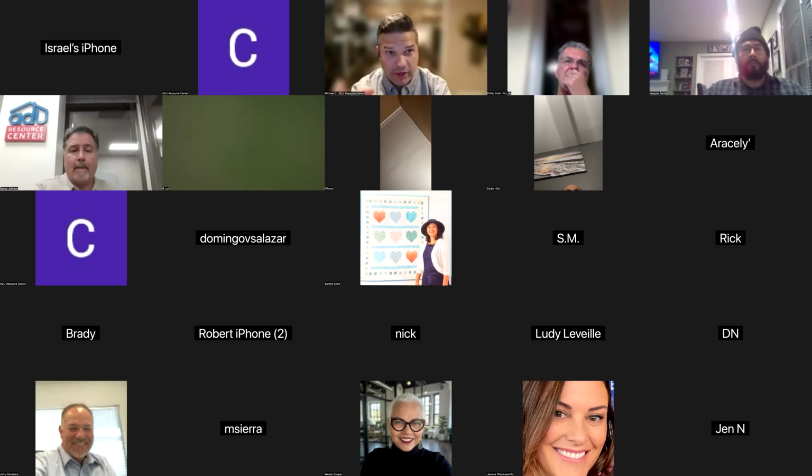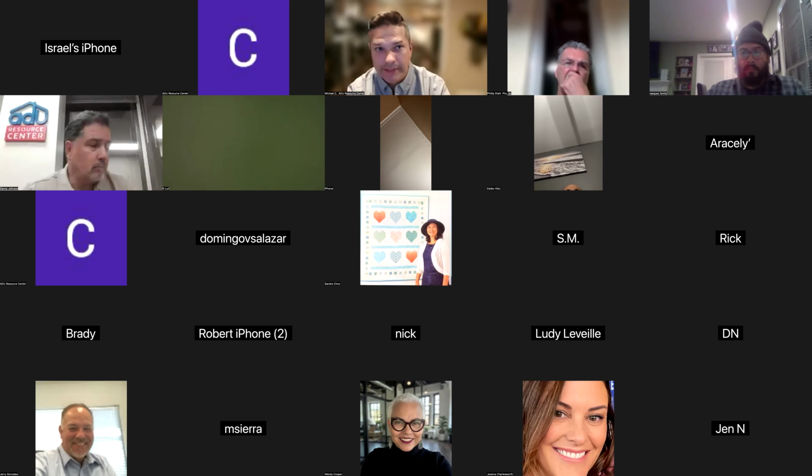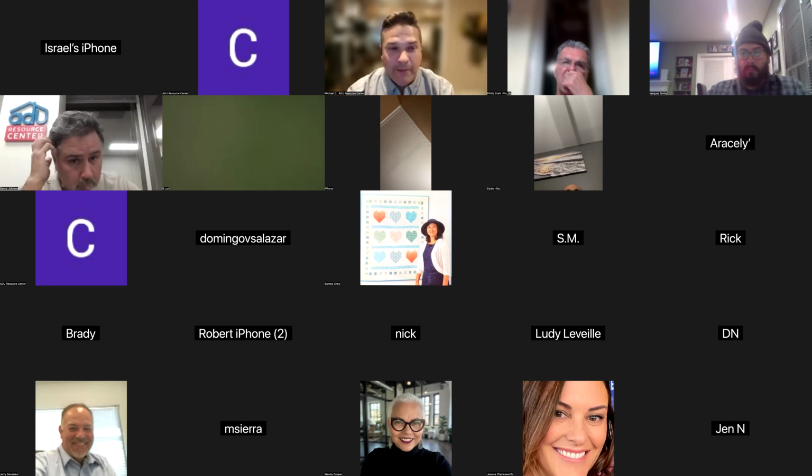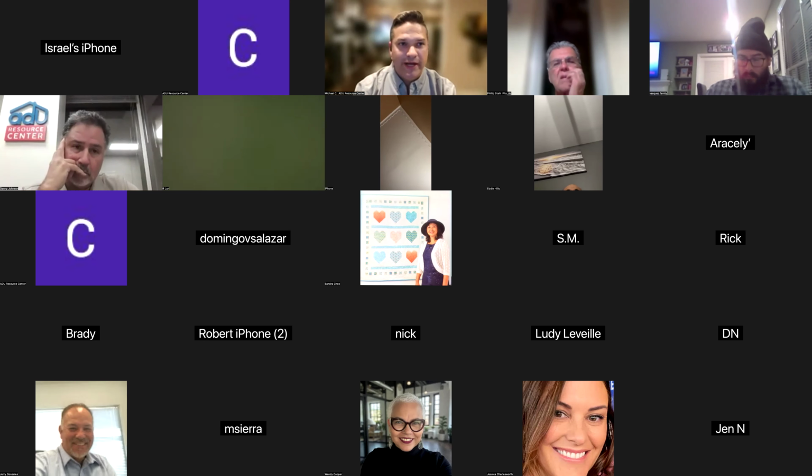All cities will have a code regarding this, and all contractors will follow this code. Now, you may say, hey, I don't mind if you come in on Sunday, I'm hoping to get this done a little bit faster, but don't be noisy because it's going to bother my neighbor. Fine. We might bend the rule a little bit there, but the rules are clearly defined. Each city has its specific timelines of when noise can happen and on what days.